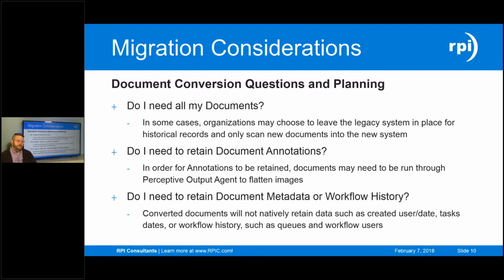If you absolutely need, for business purposes, those annotations to continue to live as a separate object on top of that document, and sticky notes to be retrievable in the same way and added to, then we would need to look at some more creative solutions. It is possible to migrate to the target environment, but you're going to significantly increase your technical risk in doing that.